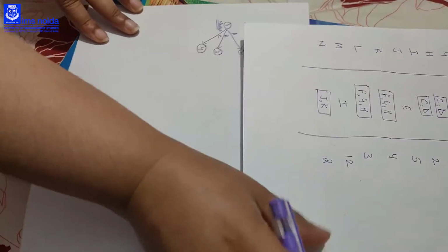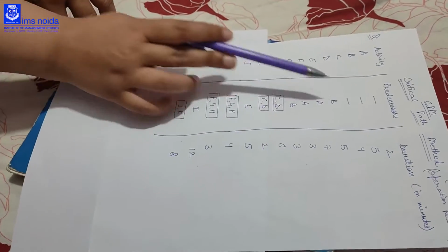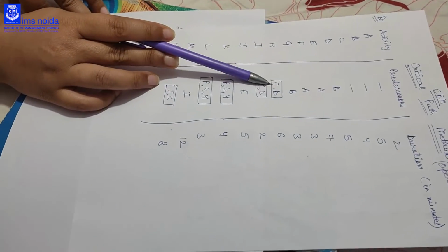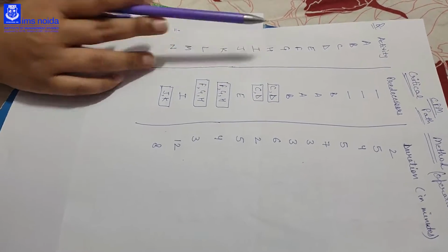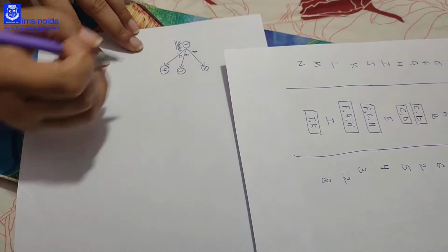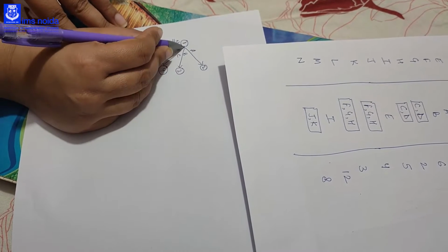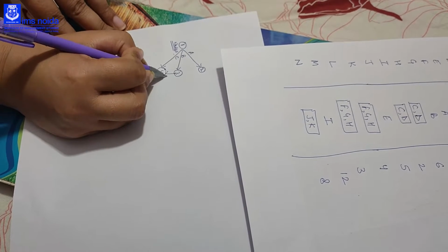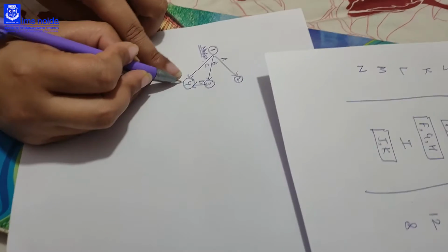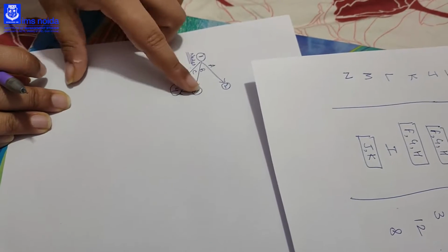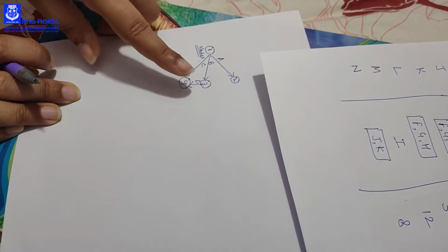So we will start the D activity from the B node and combine it with C, as we need C and D combined to start H. See here, we will start D from 3, as 3 is the node of B, and we will take D to 4, that is the node of C. So this is the D activity. Now we have completed A, B, C and D.